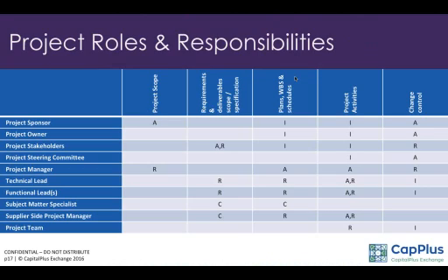Sure. Most of these positions should be there for a large project. For a small project, maybe you can scale it down. An example is the project manager is responsible for the project scope and change control, but only accountable for plans, work breakdown structure, and schedules and project activities, as other project team roles are responsible for the actual execution. Your project may use different codes, right?